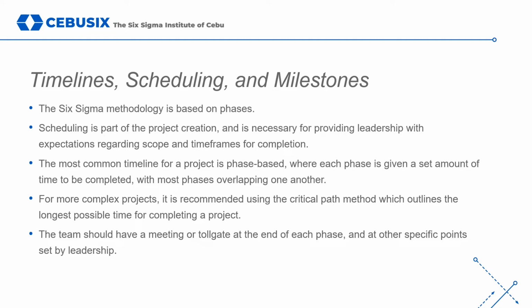The critical path method is a more detailed way of defining timelines for various elements of a project, but it does require more information and input from a project team. This means you probably won't be able to provide a detailed timeline until the project is underway. A critical path diagram could be one of the activities the team undertakes as part of the define phase.